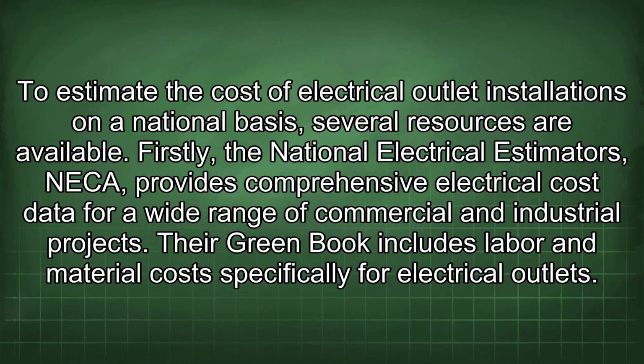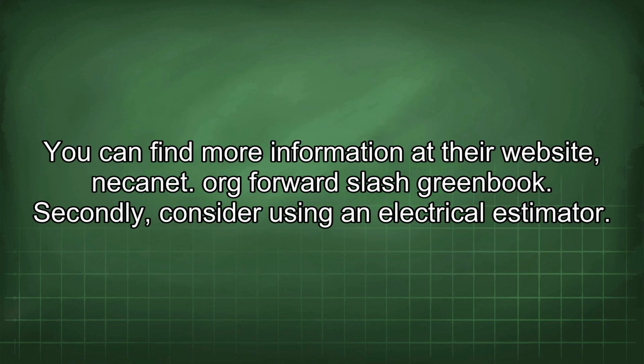To estimate the cost of electrical outlet installations on a national basis, several resources are available. Firstly, the National Electrical Estimators (NECA) provides comprehensive electrical cost data for a wide range of commercial and industrial projects. Their Green Book includes labor and material costs specifically for electrical outlets. You can find more information at their website